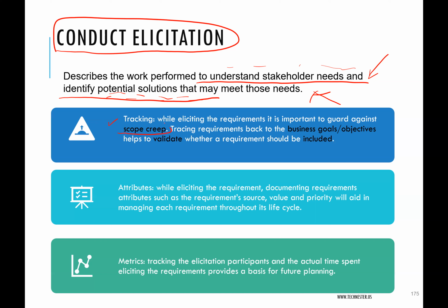Now, this is where we can talk about scope creep. For some of us that don't know the meaning of scope creep, this is when we have decided that we want to do A, but then people start adding small letter A to it, then somebody adds B, somebody adds big B, somebody adds C, somebody adds big C, somebody even goes as far as adding O. You see, this is what we decided we want to do, A. And A was approved, and we got money for A, and we got resources. So time, we plan time and money for A.